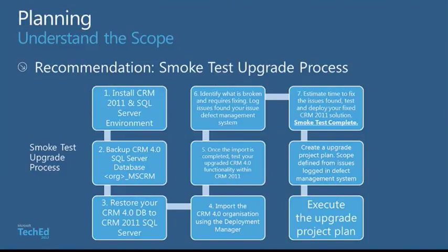If there are certain areas, maybe in JavaScript or plugins, where code is not working, or is using incorrect URLs because the WCF service layer has changed, or is using the old .NET data types that you want to change over to the .NET 4 data types, you can hand that to developers or people that have the capability of estimating that, and they can put together the estimates. You can then build a project plan from that, and that will tell you how long things are going to take to build, test, and implement, deploy.